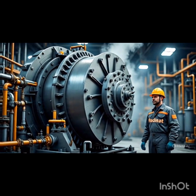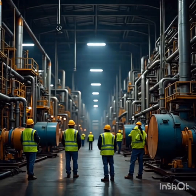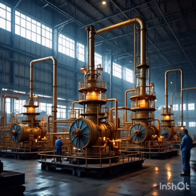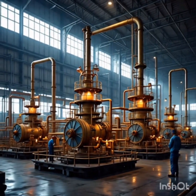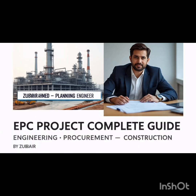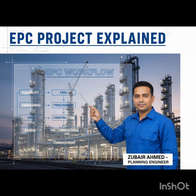main engineering stages. And the first big one is FEED, front-end engineering design. You called it a bridge. Yeah, it's the critical link between the initial concept and the detailed blueprints. It's not super long, maybe 6 months, maybe 12. Okay. And cost-wise, it's relatively small, perhaps 1 to 3% of the total project budget. But sounds like it's crucial spending. Oh, it's probably the most valuable money spent on the entire project.